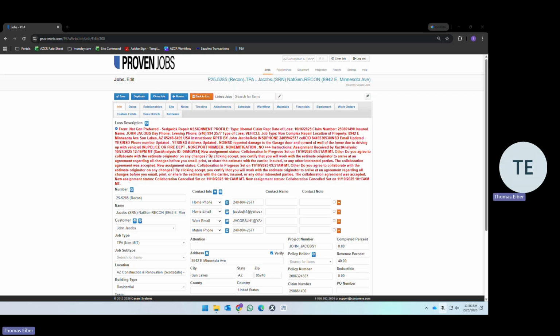Next, an overview of your role, beginning to end. Your role begins upon assignment after ops, or operations managers, receive an ATP, or an authorization to proceed, meaning the estimate was approved, the contract was signed, and the invoice has been paid. It ends when a punch list or project sign-off or certificate of satisfaction is signed and PCN is given to operations manager.